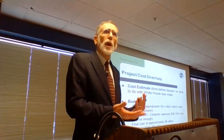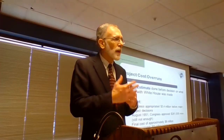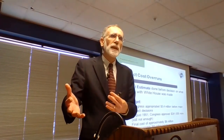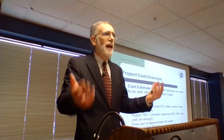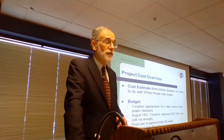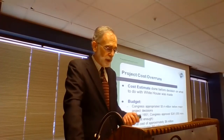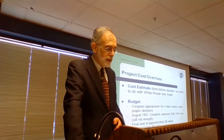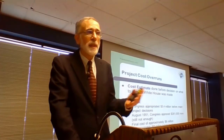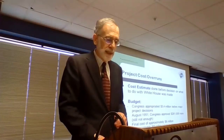So there were also cost overruns on the project. One of the things that happened, of course, is they developed the budget. Congress gave them $5.4 million before they knew what they were going to do. So obviously there are going to be some cost problems. Congress did appropriate some additional money in August 1951. They gave $261,000 more. Ultimately, it cost about $6 million, which is about $60 million in today's money.